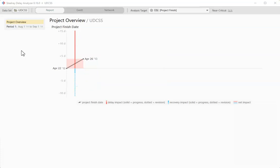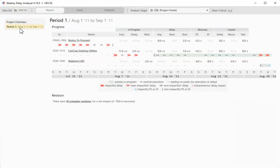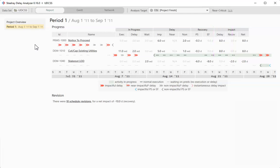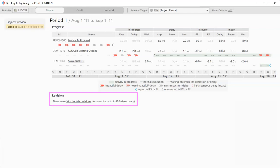Now, you may need to explain those delays and recoveries, and this is what Delay Analyzer does so well. I will click on this period, and I can instantly see that the 16 days of delay were due to those first two activities. Each delayed the finish date by 8 days. I can also see that the 2 days of progress recovery was that third activity. Great, but what about the 10 days of recovery due to schedule revisions? How and why did that happen?